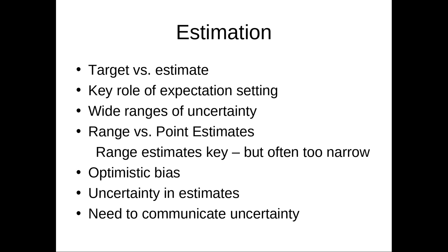It's not a considered estimate. What helps a lot is you start to think, okay, what's actually required for this job? What are the particular tasks that are needed? What would I need to implement? Okay, I need a parser. I need to get a parser in place. I need to research parser libraries.